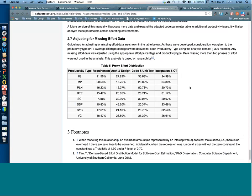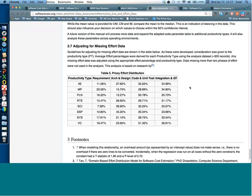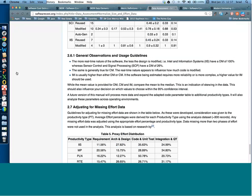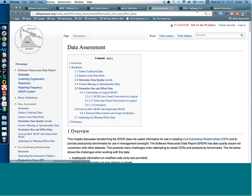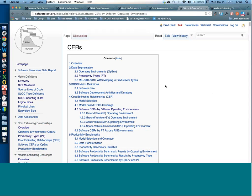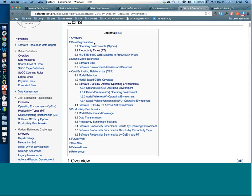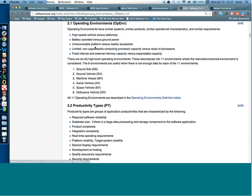We processed the data and got it ready. Now let's look at the cost estimation overview. The first thing we did was keep equations to one variable — just size — to estimate effort, which can then be converted to cost. We decided to group our data into two types: operating environments and productivity types. The operating environments we used for grouping are: ground site, ground vehicle, maritime vessel, aerial vehicle, space vehicle, and ordnance vehicle — all fairly DOD-specific. A reference table describes these in more detail.